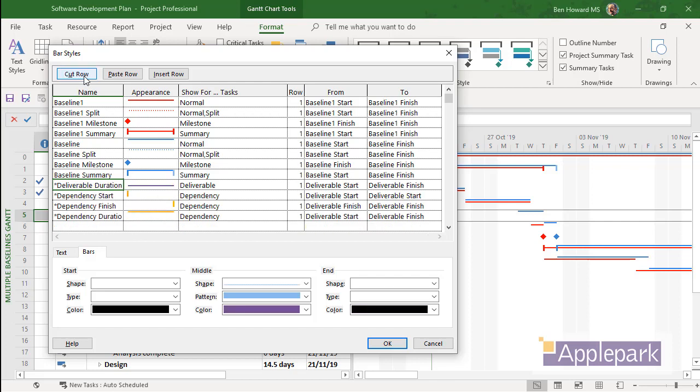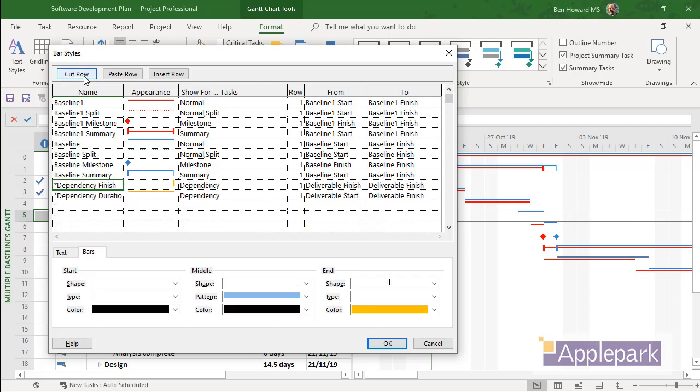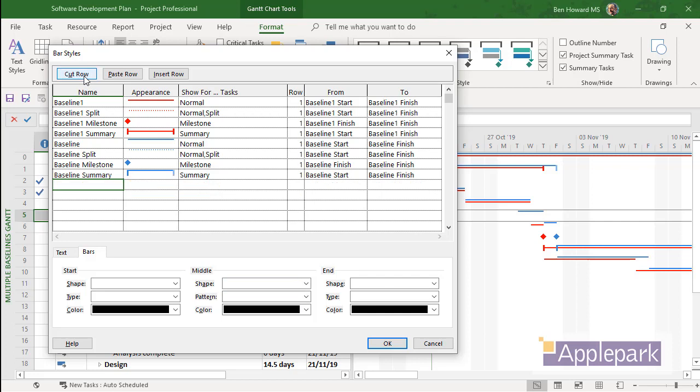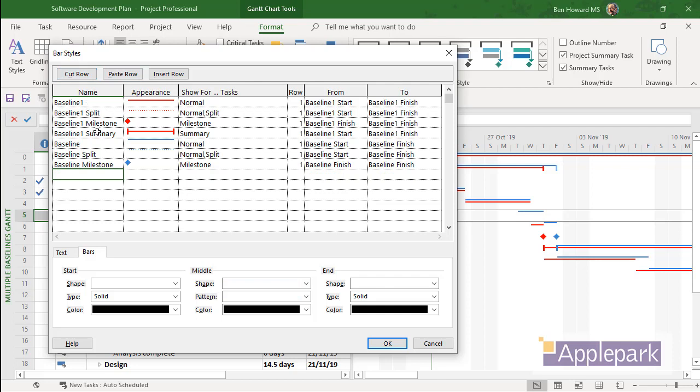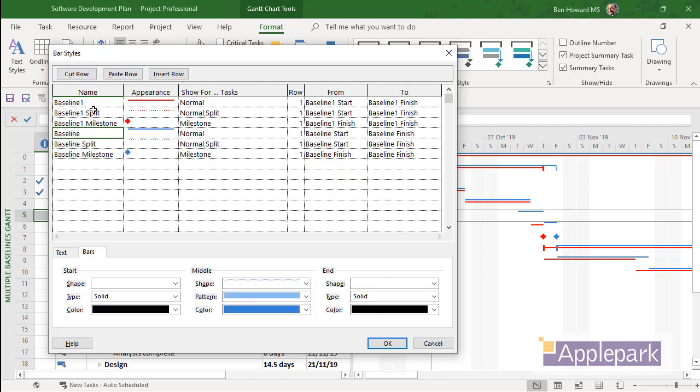Deliverables, deliverable finishes and durations. Dependency starts, finishes and durations. I really don't care about. I also am not too concerned about displaying Baselines for Summary Tasks. That kind of gets a bit confusing. Look at the confusion we've got here on this Summary Task. So I typically just am concerned in most instances about Detail Tasks. So anything for a Summary Task, we cut those out as well. Split Tasks, you might leave those in or take them out. I'll leave them in for now.